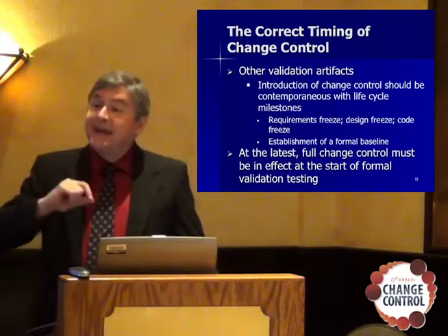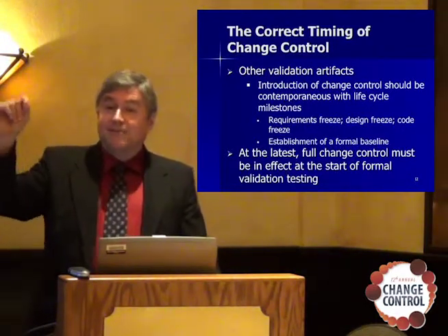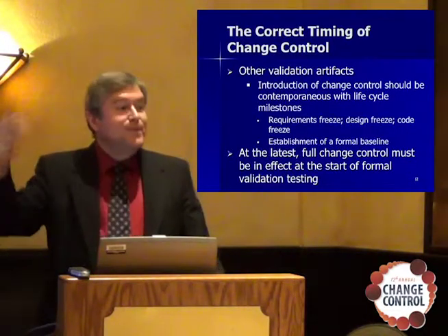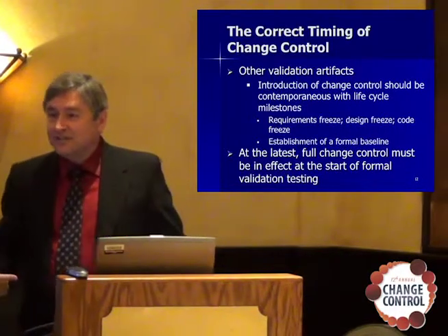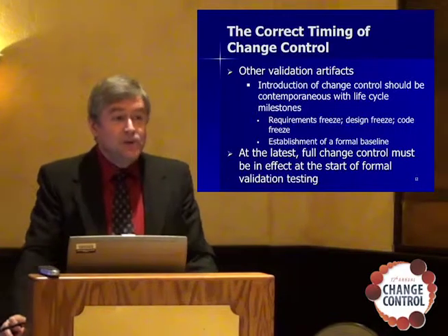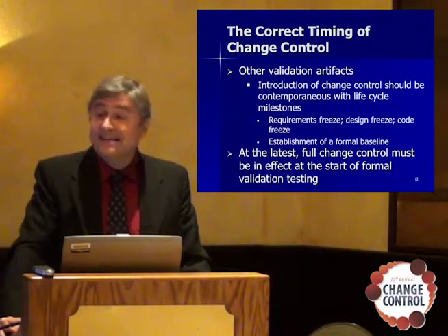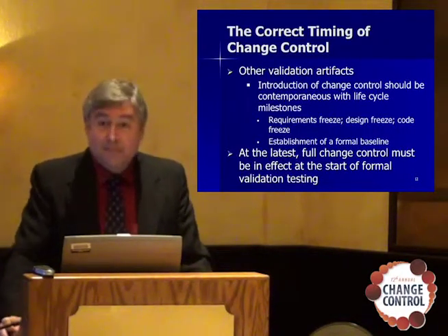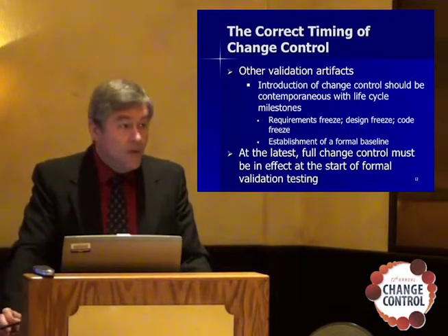So what we did was we made, again, a master list and said, global labeling system version 1.0 is comprised of the following things. And we listed each configuration ID along with its revision, and we kept that in a control document. So when we said we were testing global labeling system version 1, we knew exactly what configuration we tested. You've got to be able to do that. And the only way you can do that is by having change control in place.